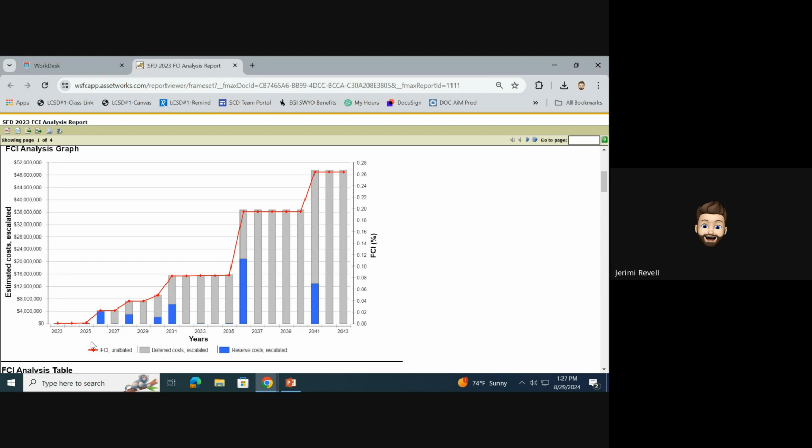Once you've reached that point, projecting 5 years out from the current year, when you hit a 0.30, then we go in and we do a Mercer study. Now, a Mercer study doesn't automatically mean a new replacement. It could be anything from do nothing to a new replacement, depending on what the study drives.